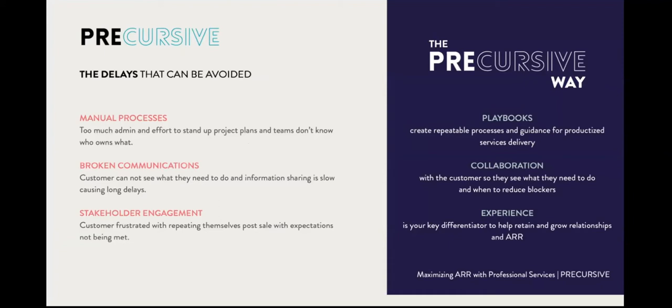And we hear all the time about project delays due to customers not making themselves available. And we see this as your problem to solve. You need to make sure that the customer is aware of what will happen, when, and what is expected of them throughout the process, and how much time they need to set aside. So when we talk about resource capacity and availability, the customer is the most critical resource impacting the overall success, and they need your direction.